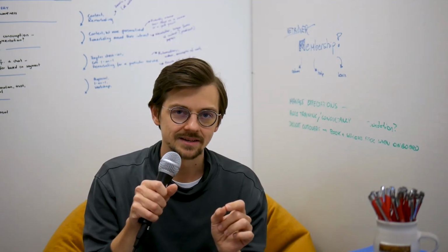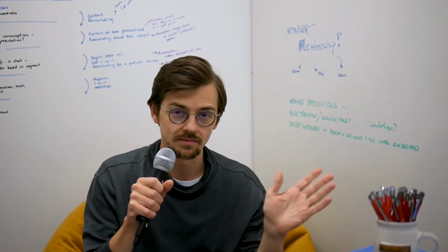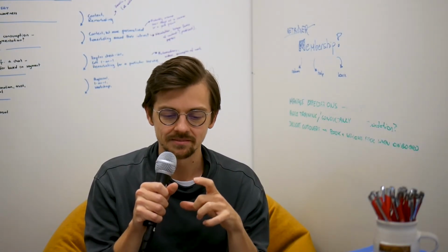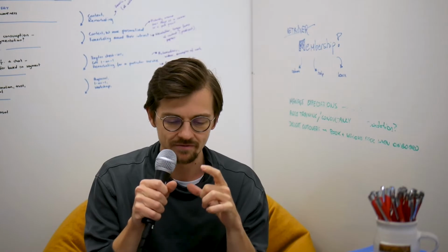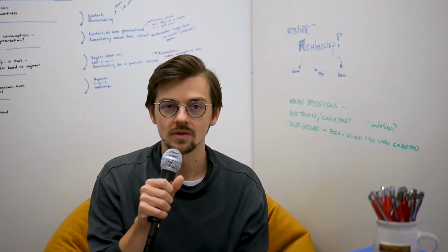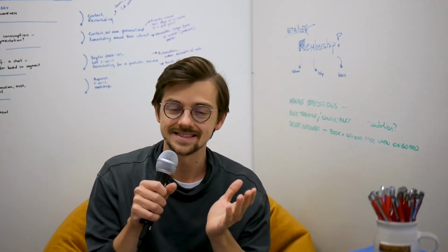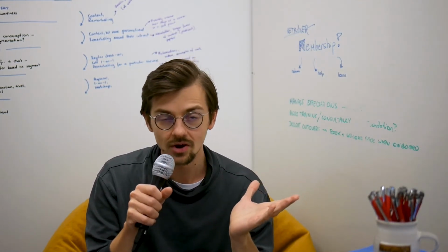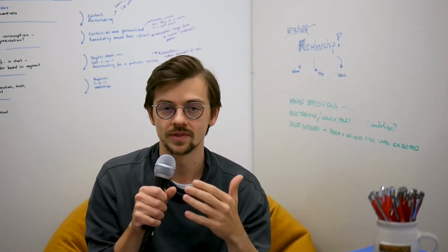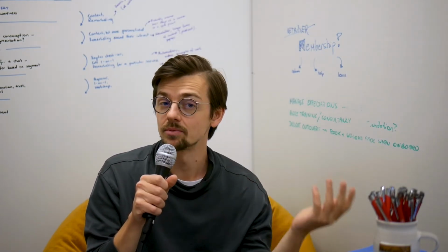There's constant alignment between team members, and that may also include external stakeholders, which I mentioned just a minute ago. Within an agile team, the alignment is strong. Everyone is on the same page, and that's thanks to all the rituals, as we call them, that are part of the process. So you meet daily, and that's called daily stand-up or daily meetup or however you want to call it, as long as it happens daily, okay? And everyone comes to the daily meeting to report what they will be working on, to mention any issues, and recap on the previous day.